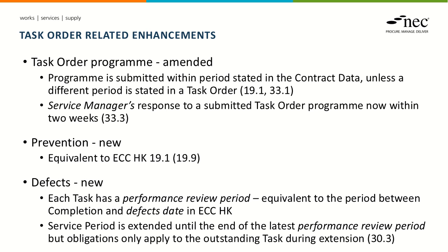And during that period, we are monitoring the work that was done under the task order. And as and when defects arise during that performance review period, there are then obligations around how those defects are dealt with. Once the performance review period ends, the intention is that we wouldn't keep on looking at defects for that particular task because we might have moved on to doing other tasks under the contract.